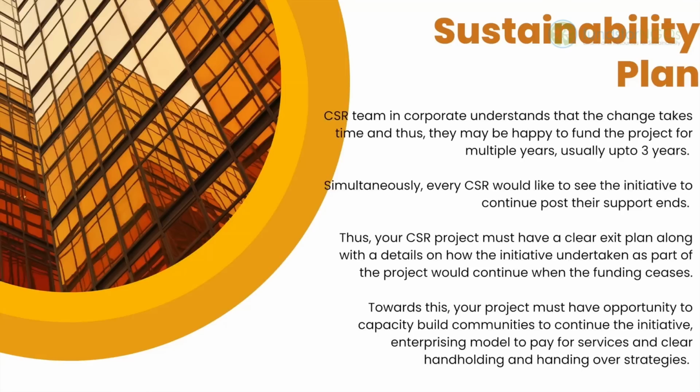Sustainability plan. CSR team incorporates understand that the change takes time and thus they may be happy to fund the project for multiple years, usually up to 3 years. Simultaneously, every CSR would like to see the initiative to continue post their support ends. Thus, your CSR project must have a clear exit plan along with details on how the initiative undertaken as part of the project would continue when the funding ceases. Towards this, your project must have opportunity to capacity build communities to continue the initiative, enterprising model to pay for services, and clear hand holding and handing over strategies.